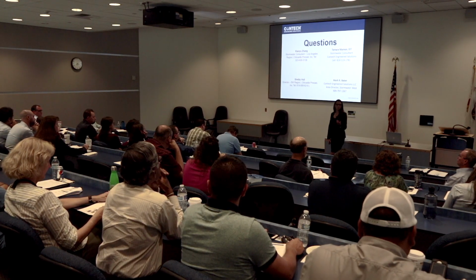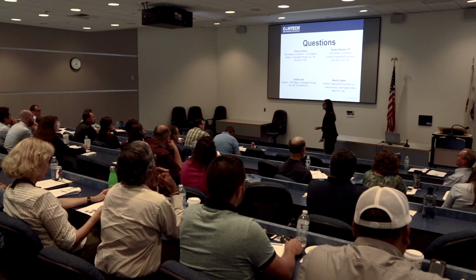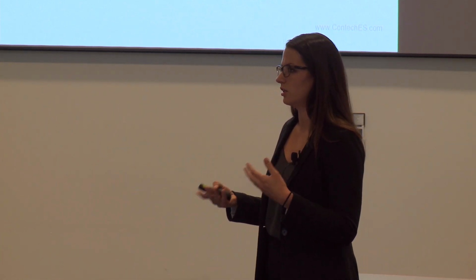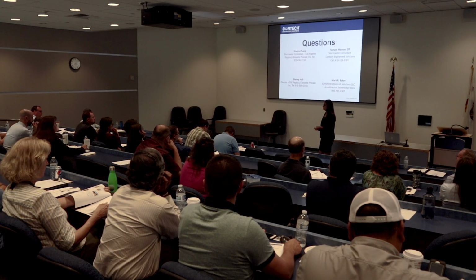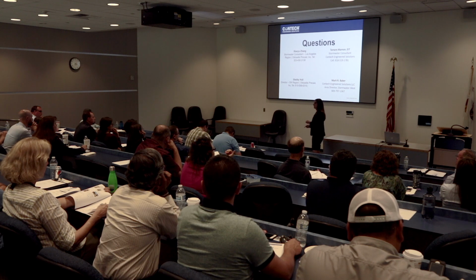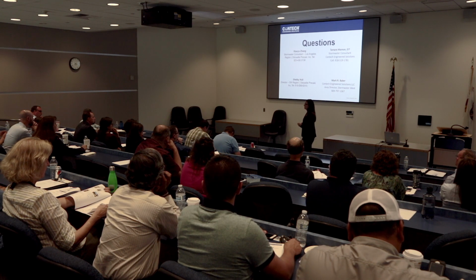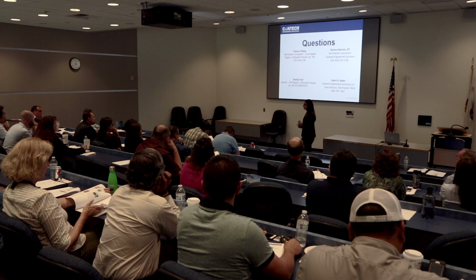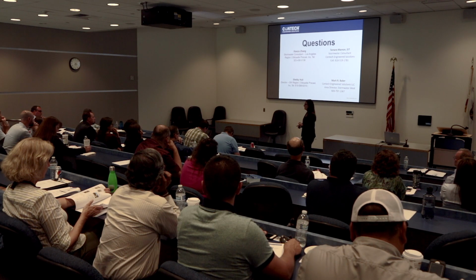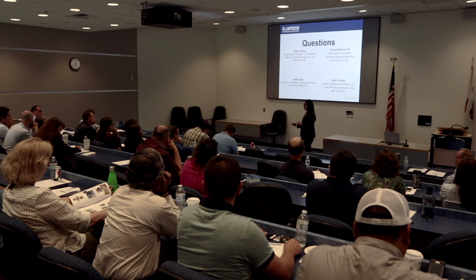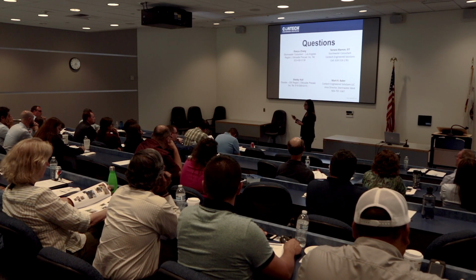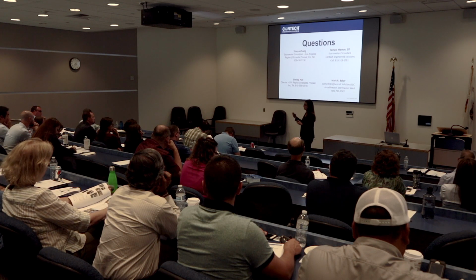So as Shai mentioned, a lot of these processes are iterative and we update them as they go along. So DYODS is generally just an engineer, somebody went on, they got a quick sizing and put it in their plans. They have a proposal drawing. They contacted us for at least preliminary sizing and a quote. Contract drawing is after we have everything, it's said and done, and we have a site-specific detail for them. So I would look at the contract drawing as your final submittal.